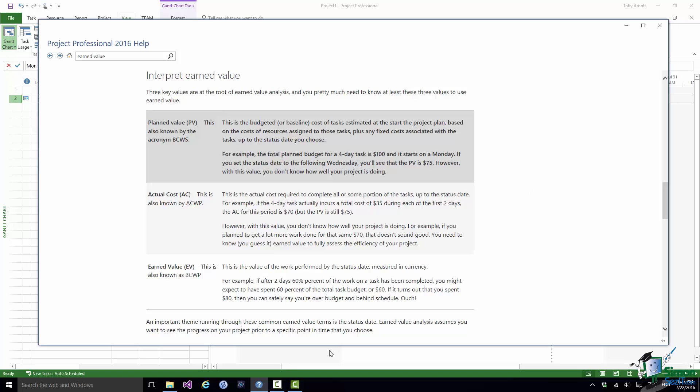So the first three key statistics are PV, AC, and EV. And when you're working on Earned Value Analysis and reporting Earned Value you'll see these three terms quite a lot. PV is Planned Value. Now all of these are basically measured at your status date. So at the point where you are recording status on a project. What was the planned value? Now there is an alternative term for PV and that's BCWS. And in some ways BCWS is a more helpful term. It's the budgeted cost of the work scheduled. So given where we've got to what was the budgeted cost? How much did we think that we would spend to get here? So that's PV.